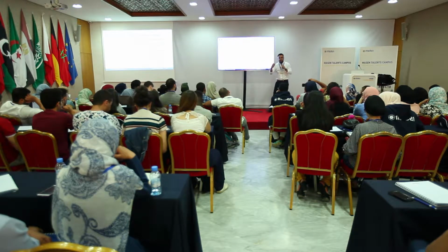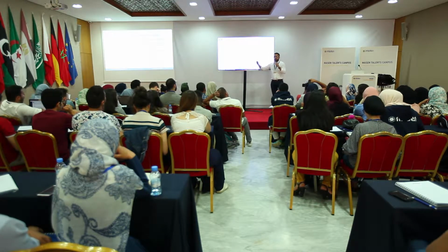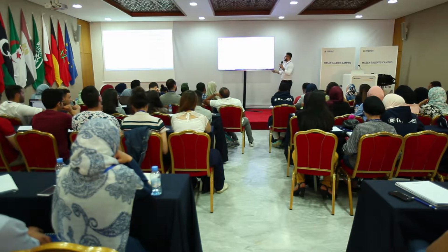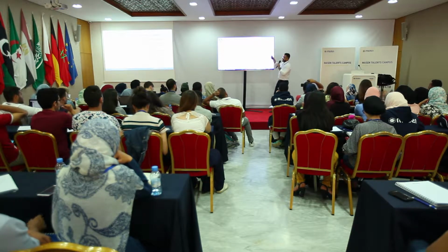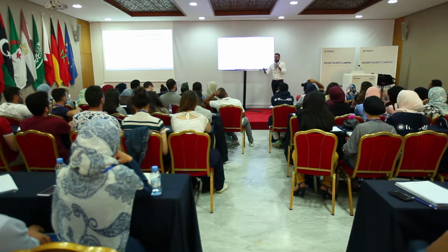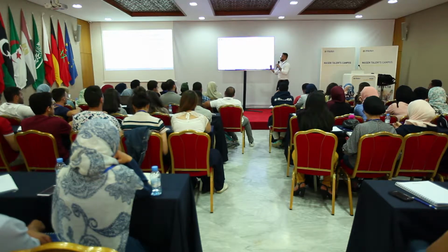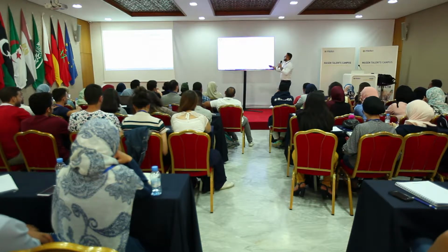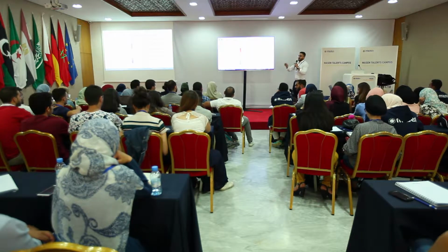So how do they make money? By increasing the margin, meaning that if the development company has a pool of 600 million, and the engineering company knows this is the budget allowed, then basically they will try to get the cheapest components, which are not necessarily the most efficient ones, such that the plant complies with the minimum requirements and they can increase the margin. So from the cheapest up to the 600 million, right? That's their business. But then again, it's the role of the developer to check that they don't just go for the cheapest Chinese components, because then maybe from a system perspective, the plant ends up being something that is not what they were supposed to bid for.